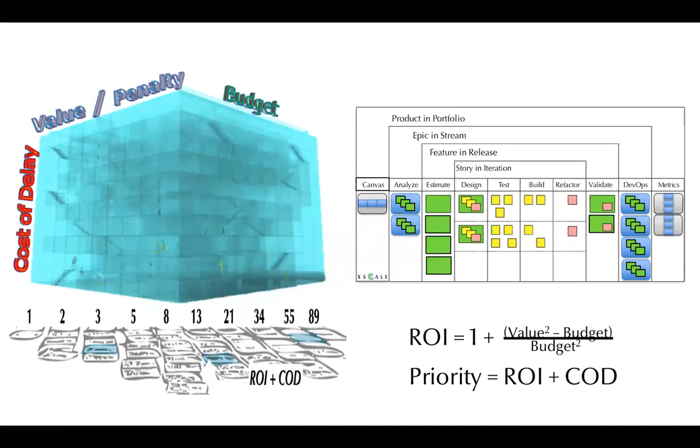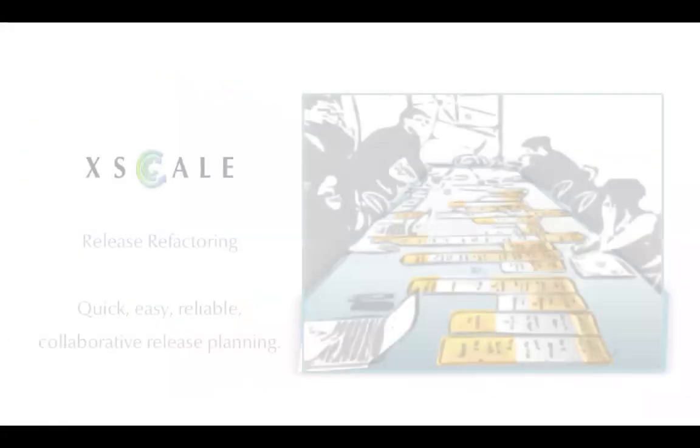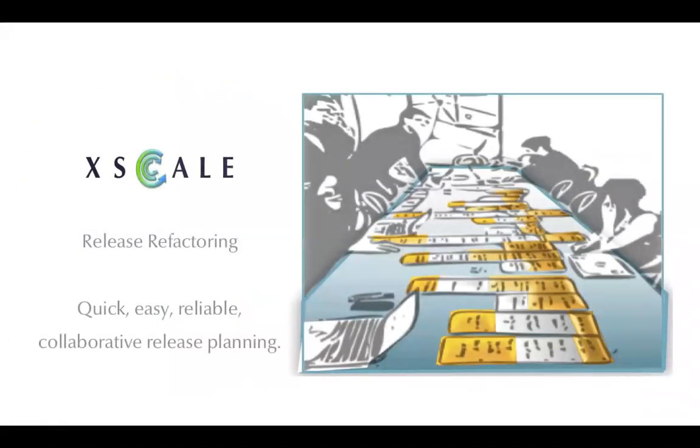If we start with ROI calculation and then bring cost of delay, we have an orderly way of working it in, and statistically smear the components. We don't divide urgency by duration, which is just nuts. Instead we'll go, well, which parts of this big thing are urgent? And we can split it up using the acceptance criteria we talked about.